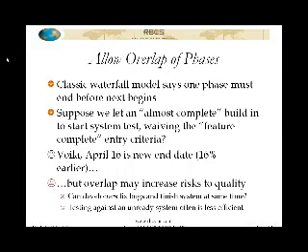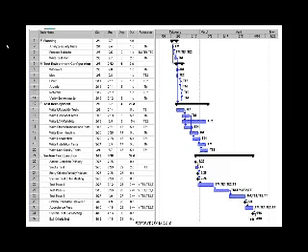Also have to recognize that for us as testers, we're testing against a system that's not done. We might have a higher than usual rate of test blockage, right? So that could be less efficient as well. So this is one of those things where you change one factor and that ripples through to others. So that's generally going to be true in an estimate, that when you change an assumption or factor, that's going to have consequences. Okay, so there's what it would look like if we said we're going to start 2 weeks early, and that's going to pull us in by 2 weeks.